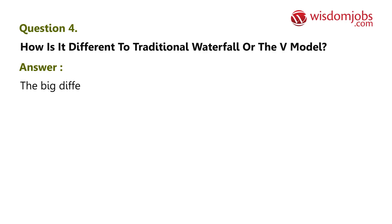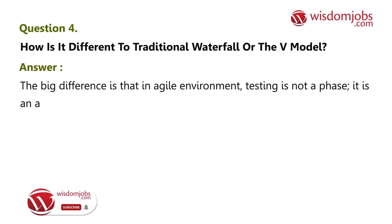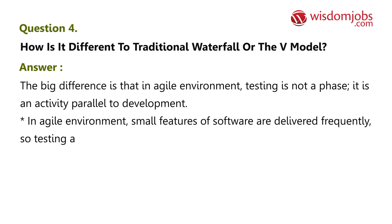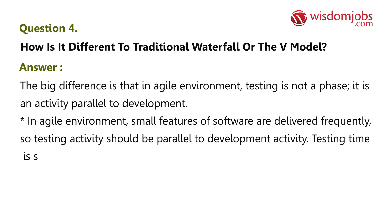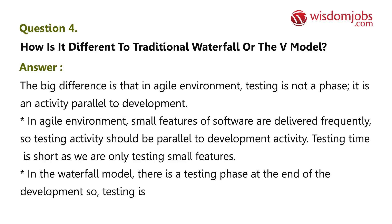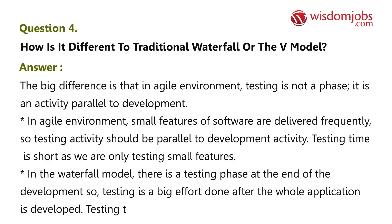Question 4: How is it different to traditional waterfall or the V model? Answer: The big difference is that in an agile environment, testing is not a phase — it is an activity parallel to development. Small features of software are delivered frequently, so testing activity should be parallel to development activity, and testing time is short as we are only testing small features. In the waterfall model, there is a testing phase at the end of development, so testing is a big effort done after the whole application is developed, and testing time is long as we have to test the whole application.